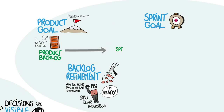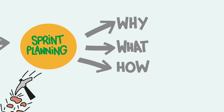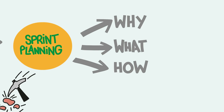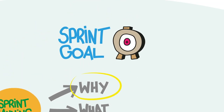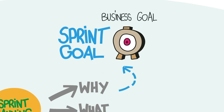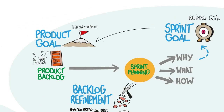The Scrum Team takes on work through the sprint planning process, which addresses three questions: why, what, and how. Why are we doing this sprint? The answer, called the sprint goal, is a business goal that represents the best step forward to achieve the product goal. It is not a stretch goal — the team believes they can accomplish the sprint goal during the sprint.